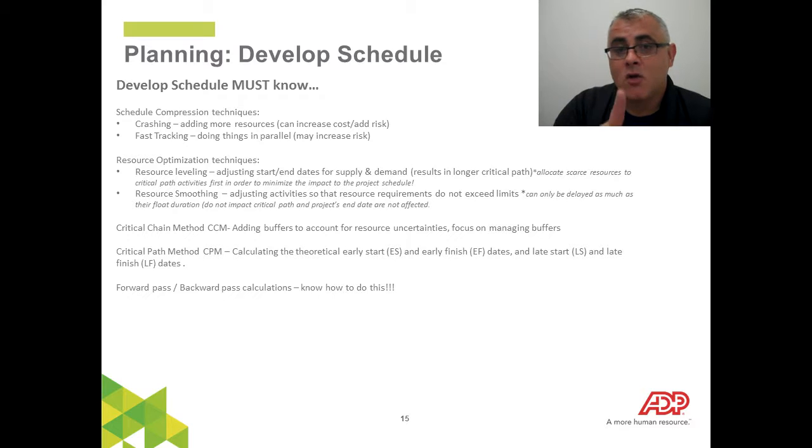Crashing could have an impact on the cost of that particular activity, and an impact on the overall project cost. And then finally, it could potentially have some risks involved in that. You'll get more into that when you get to risk and understanding project risk management, but just know crashing could have an impact on your cost and could have potential risks.